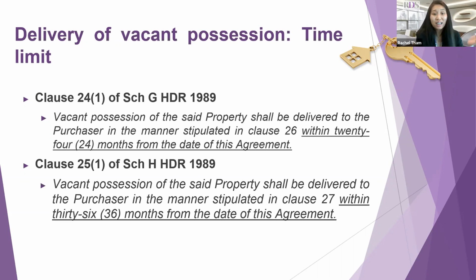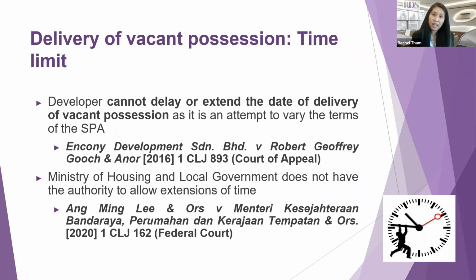As for strata titled properties, such as condominiums and apartments, Clause 25.1 of Schedule H HDR 1989 provides that it has to be within 36 months from the date of the agreement. The terms of the SPA are statutory terms that must be strictly adhered to and cannot be varied or contracted out.